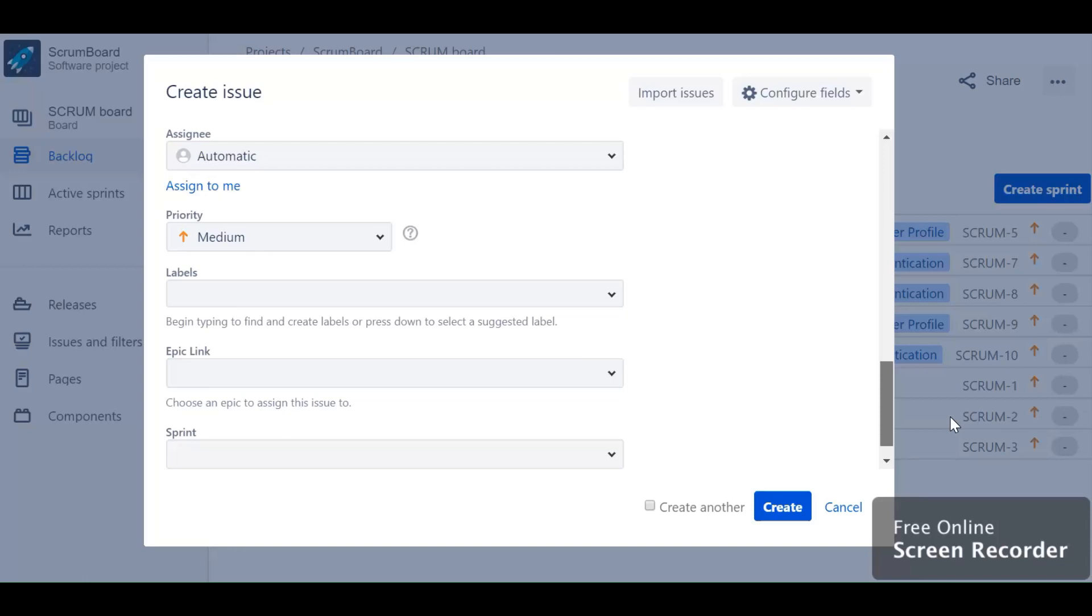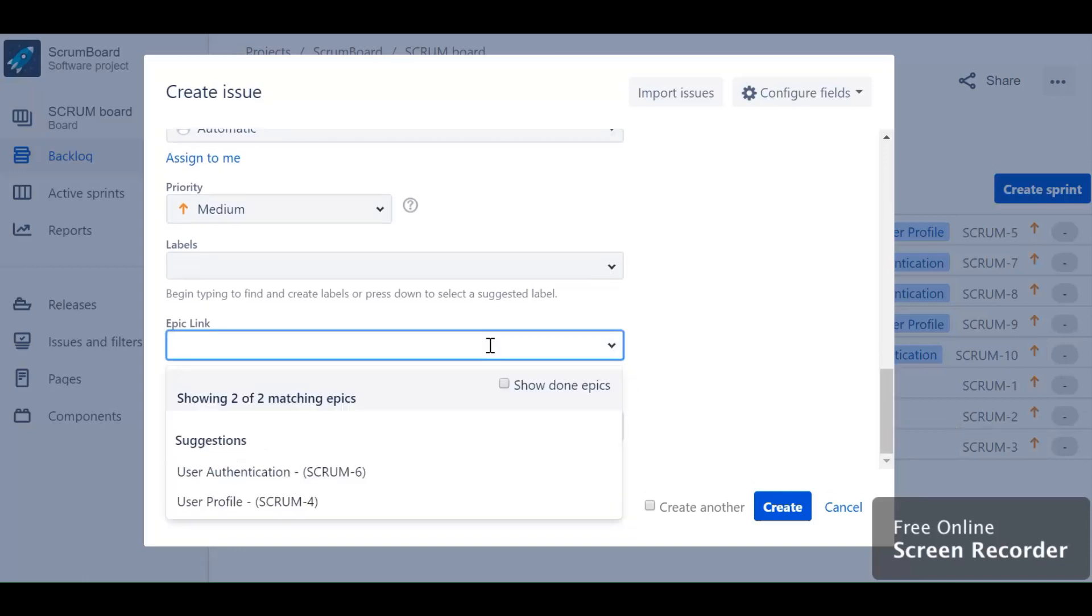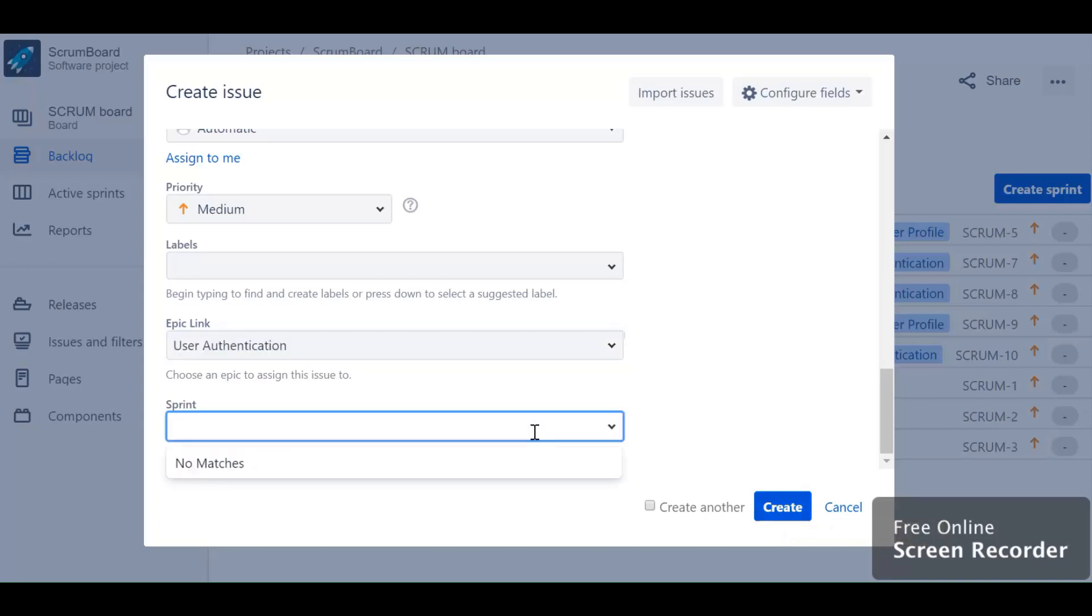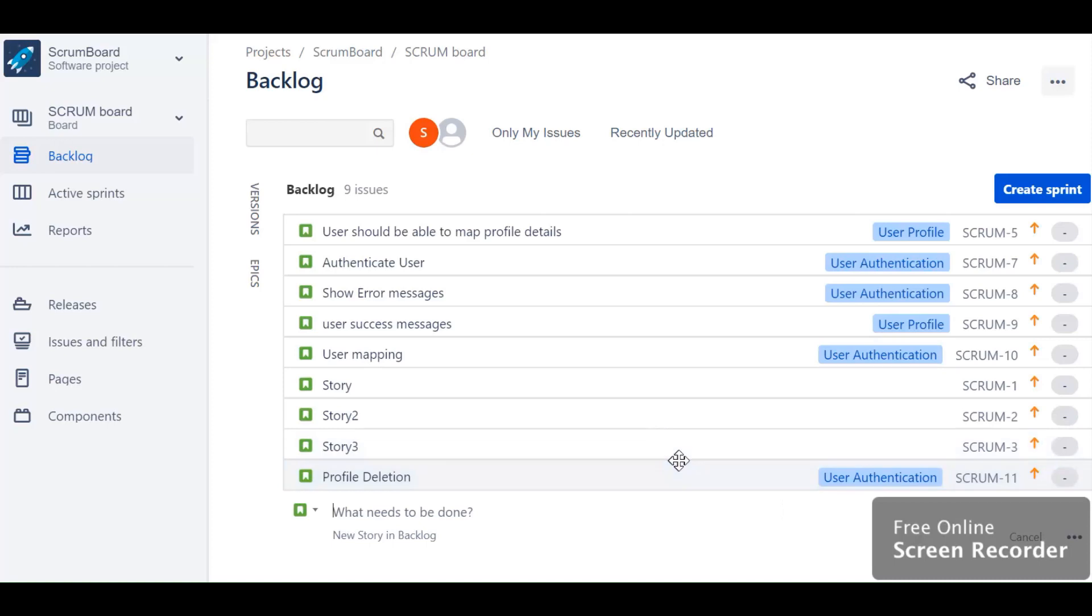It's a good practice to have a parent epic against each story. There is no active sprint or sprint I have created in the backlog, so it's empty. Let's create. Click on the create button. Here is the story which I've created directly from the backlog.